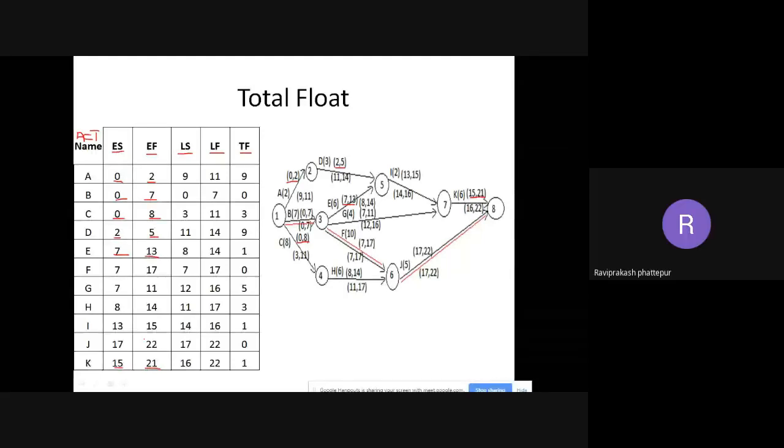So okay, coming to the latest start or the late start and finish. Some people will use latest, some people will use late, but anyway, it means the same. So we are starting it later. So now we need to write the things that are later. That is the backward pass we need to write. For ES and EF, what you have written is the forward pass, that is on top of the arrow. Now for the backward pass or the LS and LF, we need to write the backward pass for that